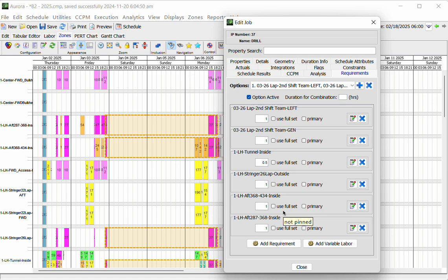That's because I just need to lock down the zone. In this particular case, the fact that there are 2 people versus 1 person does not change the amount of space I need to lock down. So you can see that they actually did not need as much of this space. There are pros and cons to this. This gives you a huge amount of flexibility, but it does mean that you actually have to think about how those relate. We don't just presuppose that 2 people take up 2 spaces.